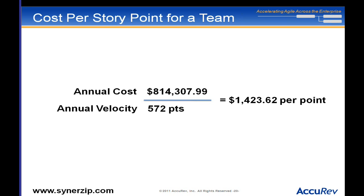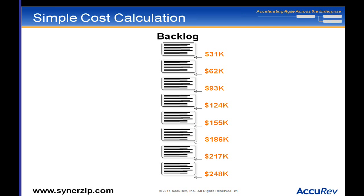Dividing that out gives roughly $1,400 per story point. Then looking at it per iteration: 22 points times $1,400 is about $31K per two-week iteration. Once I have that metric established, I don't have to recalculate it all the time — I know that every two weeks that team costs me $31K fully loaded. If I wanted to do that same work somewhere else, it needs to cost me less than $31K for that team, assuming I'm getting the same velocity.